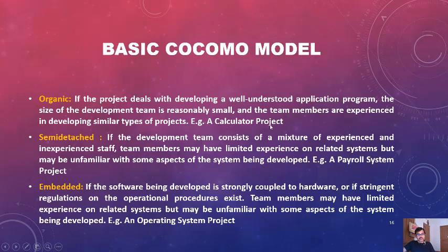But in semi-detached, the development team consists of a mixture of experienced and inexperienced staff. In organic there are experienced staff, but in semi-detached the team is a combination of experienced and inexperienced staff. The team members may have limited experience on related systems, and may be unfamiliar with some aspects of the system being developed.